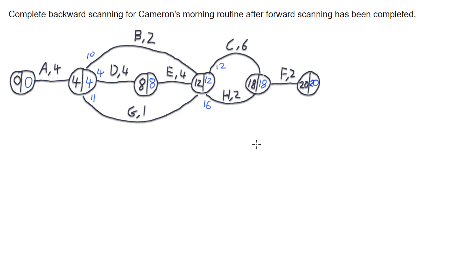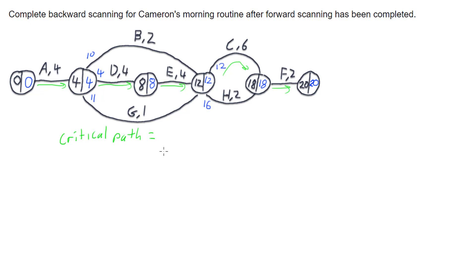From this we can identify our critical path. The critical path is a path through the network that follows the nodes that have equal values in them, but also follows the arcs that cause that — the longest activities. My critical path comes through A, then D (that's how I get to that node), then E (because that path took a total of 8 minutes, definitely longer than 2 and 1), then C (which was 6 long compared to 2), and then F. So my critical path is A to D to E to C to F.